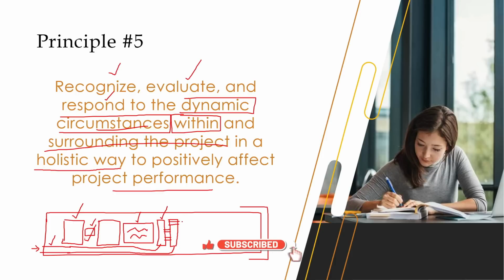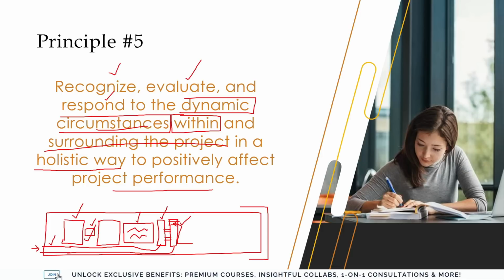Let's say there is another requirement wherein for one of the floors within the multi-level car parking, the sponsor of the project tells you that, hey, this floor will be allocated to a vendor who is interested in setting up a car wash shop within the multi-level car parking. So what that means is you need to ensure that there's supply of water on this floor so that the car wash shop can actually work. So that also is something which changes the requirements. Right now you have additional requirements.